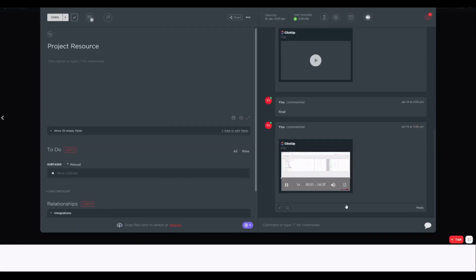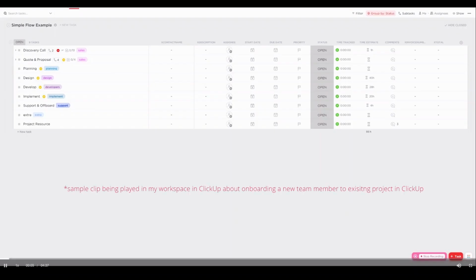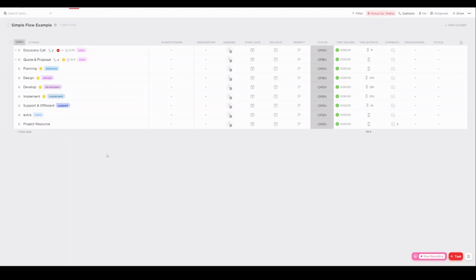Welcome to the team. This clip is one of the many clips to follow for yourself to familiarize with the project workflow for this particular project. Also the rules and the steps required for a successful completion of this project. After the template has been selected by the project manager in ClickUp, the project manager will go and assign the assignee, apply a due date, and also estimate the hours or the time needed for completion of each task. After the project manager has done that, the details of the discussion or the detailed notes of the project will be entered in the description of the discovery call task here for the team to refer to.